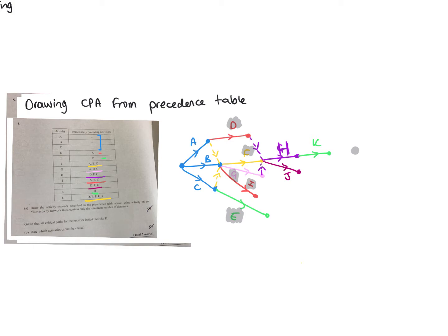So, a few of you are probably thinking, okay, fantastic, I know what we can do. We'll just do this here, and then L can come out of here. Yeah? Problem is, we cannot draw an arc if it does not have a letter to it. So this is where we now have to be a bit clever. Okay, get rid of that because that's completely wrong. So we know if nothing is dependent on K, this will have to be the last node as well. Yeah?